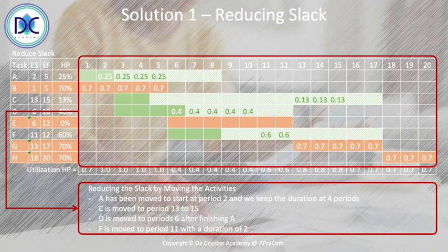One of the issues that can happen, for example, when you finish activity C so early, later on before we need to use activity C or the deliverables created by activity C, they may be damaged, they may be stored for a long time. When we change something, well, the work has been done. It means in order to change it, we may have to redo all the work, and we lose a lot of money.